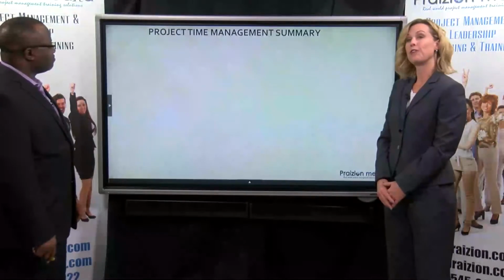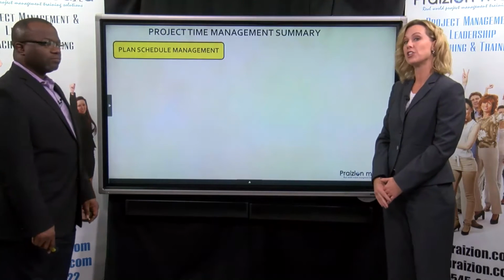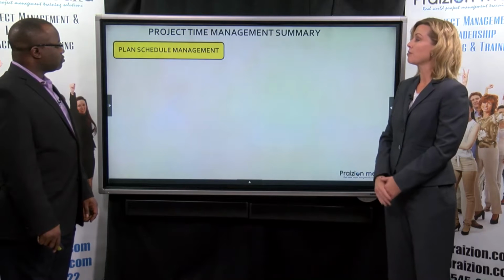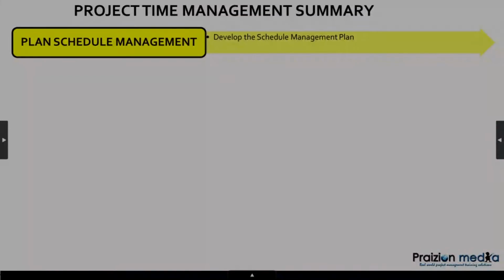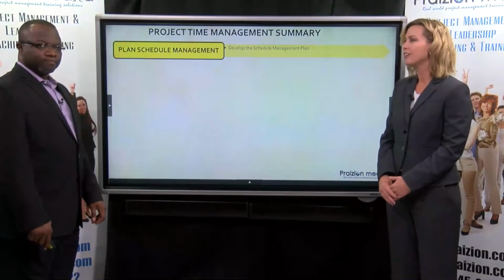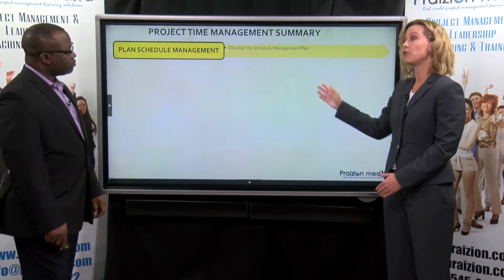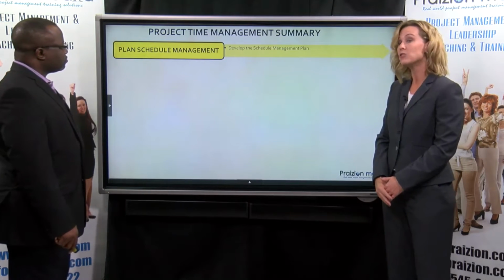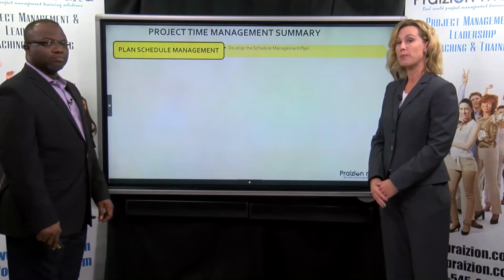We're moving on to our time management knowledge area. And similar to the last knowledge area, we have a management plan at the top of the list. Plan schedule management is a process where we develop the schedule management plan. So we have an idea as we're working the project whether or not we have the tolerance to be a little bit behind schedule. And so our schedule management plan is a formal document that requires a change request once it's been authorized, and it also is part of your overall project management plan.